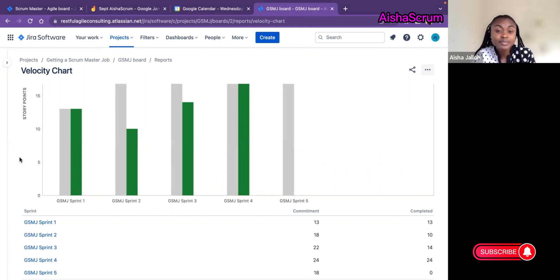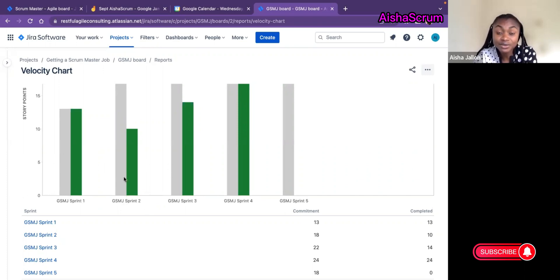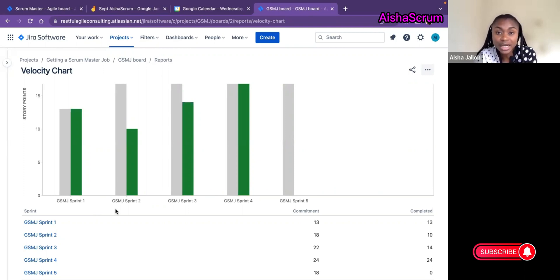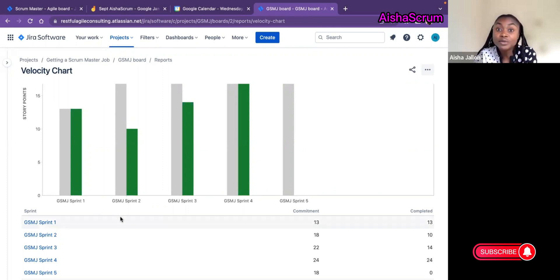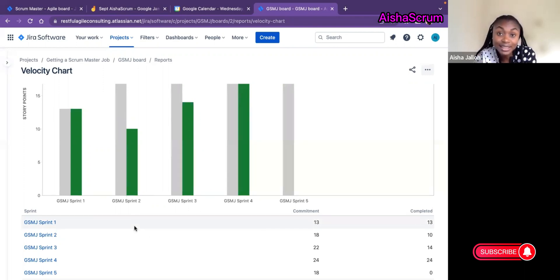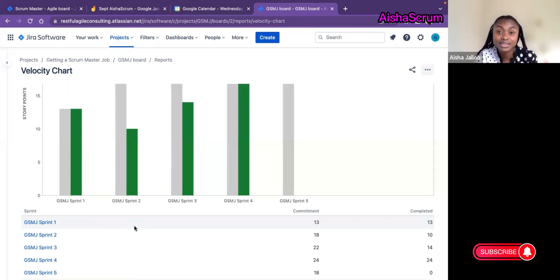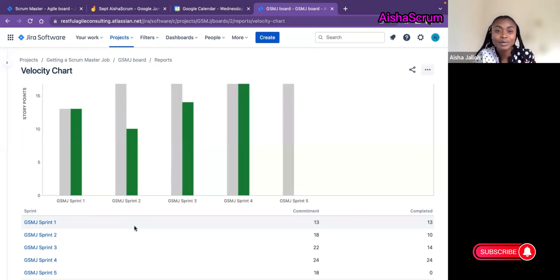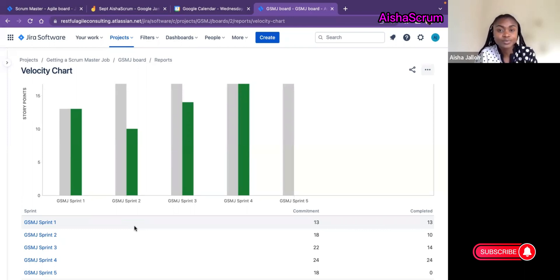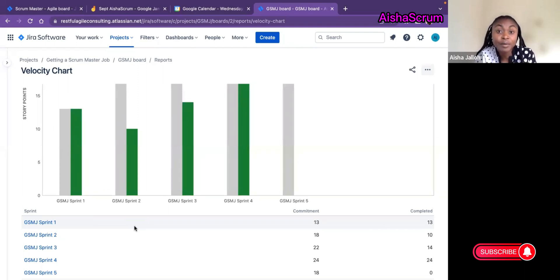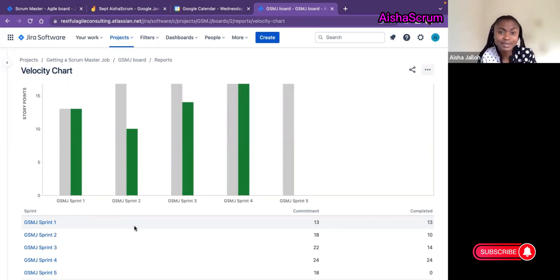Sometimes you can also notice that another factor is where you have a team that are new to Agile, or they've not done Scrum and they started doing Scrum, and sometimes you have no data to go about. It's something that you experiment together as a team. Sometimes a company will use their capacity, meaning their available hours to work. People will do one story point equals one day, which is something that does not equal to story points. But sometimes it's used just to get a baseline and estimate how much can we commit to in a sprint. That's another way you can see velocity being used.